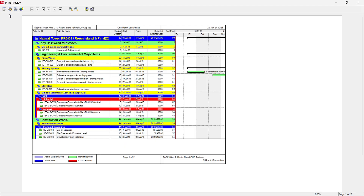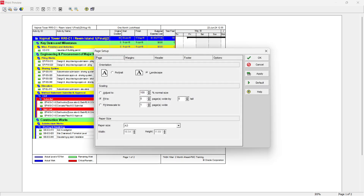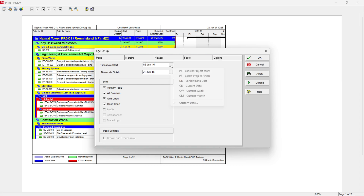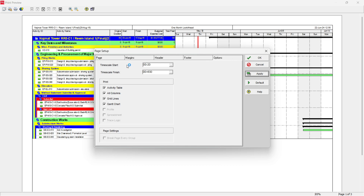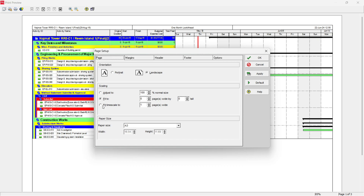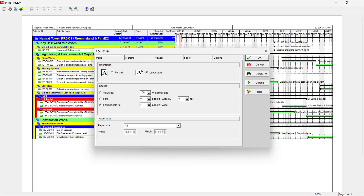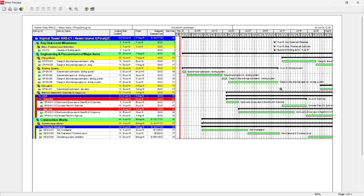To check the print view, if the layout is not fitting the full page, go to Page Setup and set the page to three pages. Then go to Options and set the start date to data date minus two days and the finish date to data date plus 63 days for a two-month look-ahead, and click Apply. If it still does not fit, go to Page and select Fit Time Scale to One Page. Now the two-month look-ahead is displayed cleanly and presentably.